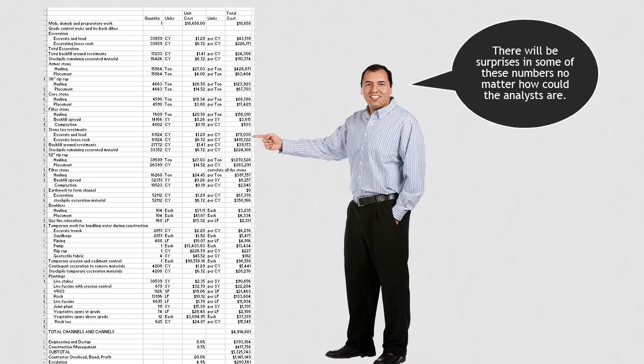Each expert gives us an honest and accurate most likely result. If we sum up the most likely results, we forecast a precise cost. The problem is we will not get the most likely value for each component. We are bound to get a few unlikely results despite the competence of our staff. And those differences can sometimes make all the difference between a good decision and a failed decision.